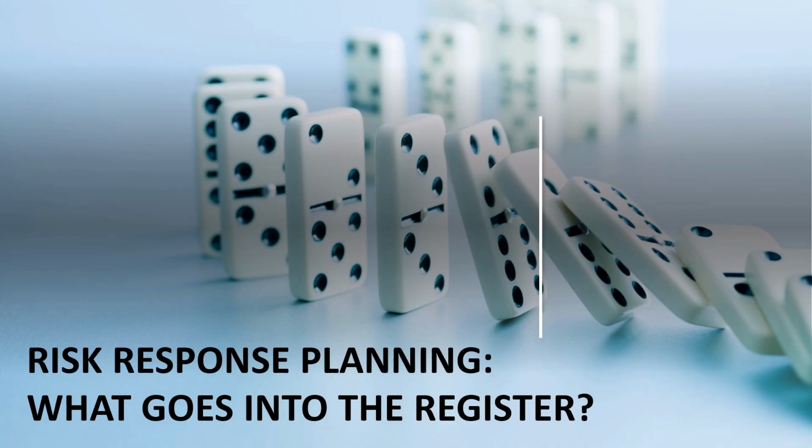So to keep it super clear, what things are definitely not decided or added at this stage? Things that happen earlier. Right, good distinction. Things like the actual effect or impact of the risk that's assessed back in risk analysis. The risk priority, that's determined during evaluation. How much risk we can even stomach, the risk tolerance, that's set up front. Right. And the basics, like the probability of the risk happening or its expected monetary value if you're doing quantitative stuff, all that calculation happens before you start planning the specific responses.